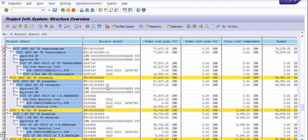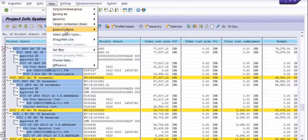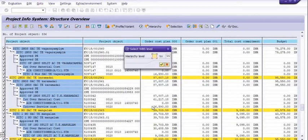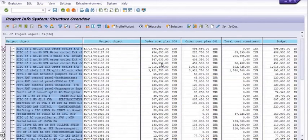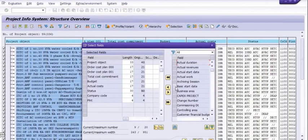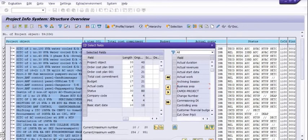In the CN41 report, we can get the status of our project, WBS, and network activity. Go to the View, select Object Type — uncheck all and check only the fields you want. For example, I just want to check WBS data only, so I set the hierarchy level to 99 because WBS are frequently created at level 2 status. All activity is reflected here — you can get the status, the budgeted amount, total cost, commitment, order cost, plan, and statuses such as takeover, release, and technically complete. Release means the WBS is still in open status. Once the WBS is closed, the status is CLSD.